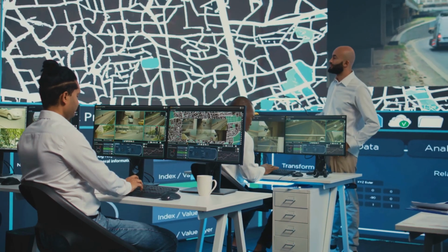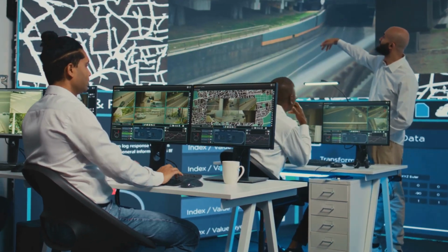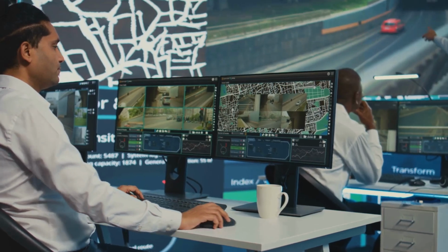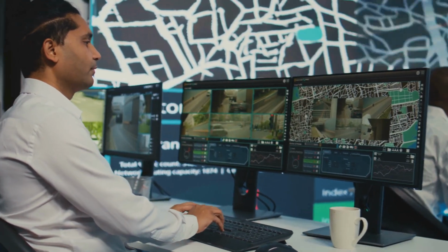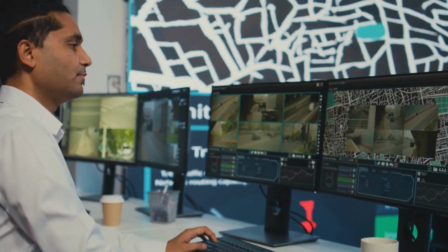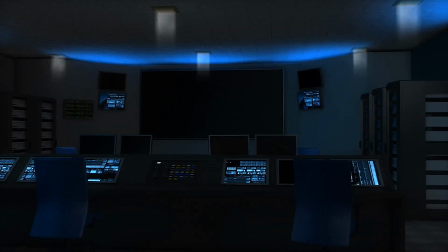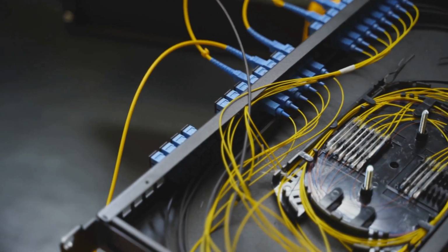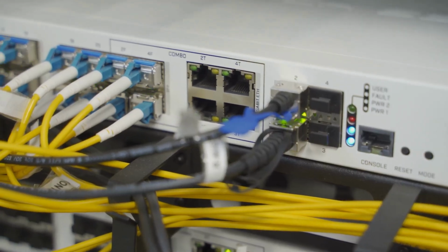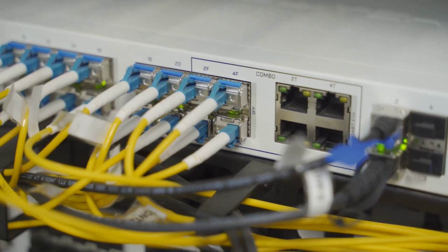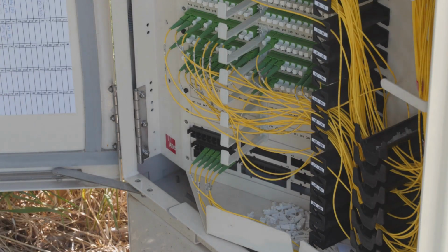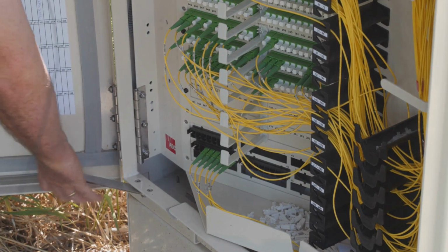The AI system begins by consuming multiple layers of geospatial data: high-resolution satellite imagery, detailed street maps, utility company records showing existing ducts and pipes, land parcel data indicating public versus private property. Specialized algorithms then go to work on this digital landscape. Genetic algorithms, reinforcement learning, can explore millions of potential route combinations in a matter of hours. They test different paths and evaluate each one against predefined cost parameters. The system learns to favor routes that maximize use of existing infrastructure and minimize new trenching, the most expensive part of any build.